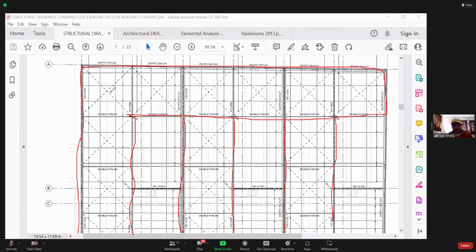Very simple. We do not need to calculate the length of the bracing? No, you're not doing individual things. You are just representing that this much area needs bracing. When you're doing your structural steel, yes, you will be doing each length, because you're measuring each member separately.